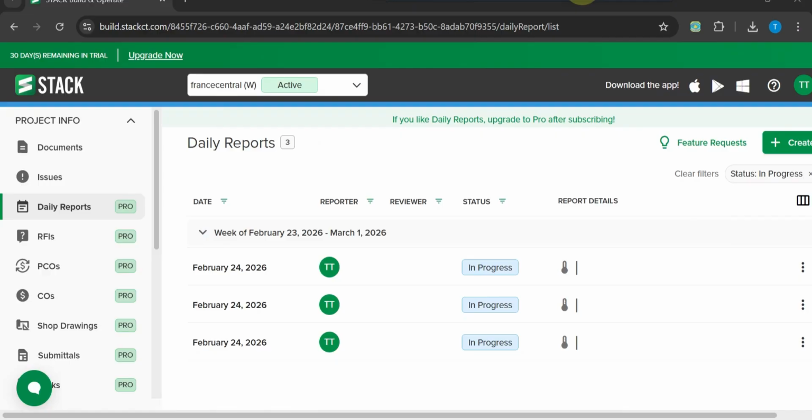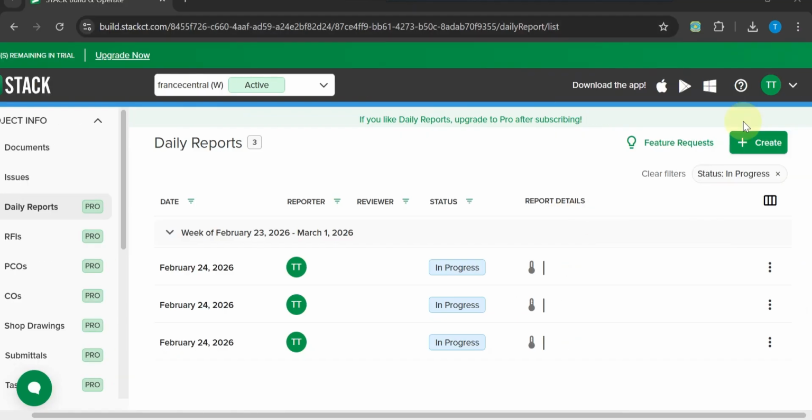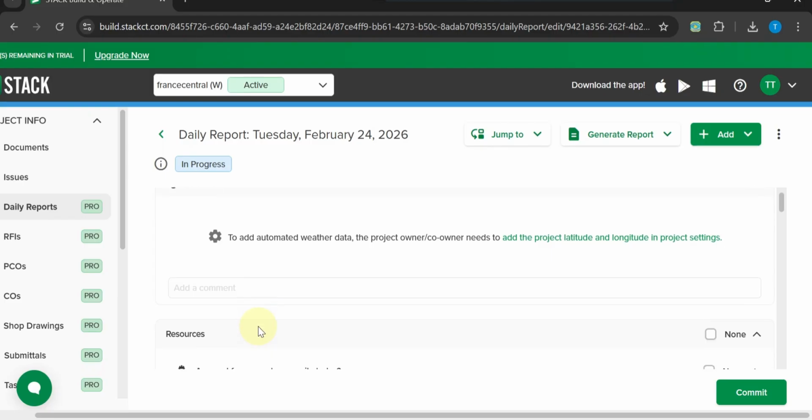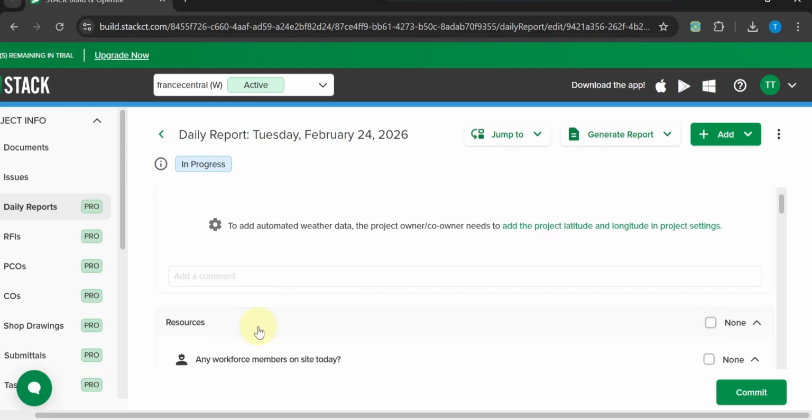Now, assemble your narrative. Start with the time frame you are reporting on. Summarize site progress using the daily reports, highlighting major accomplishments, labor usage, delays, and any weather impacts recorded by the field. Then, add the schedule perspective from workflows by noting totals for completed, overdue, and upcoming tasks.